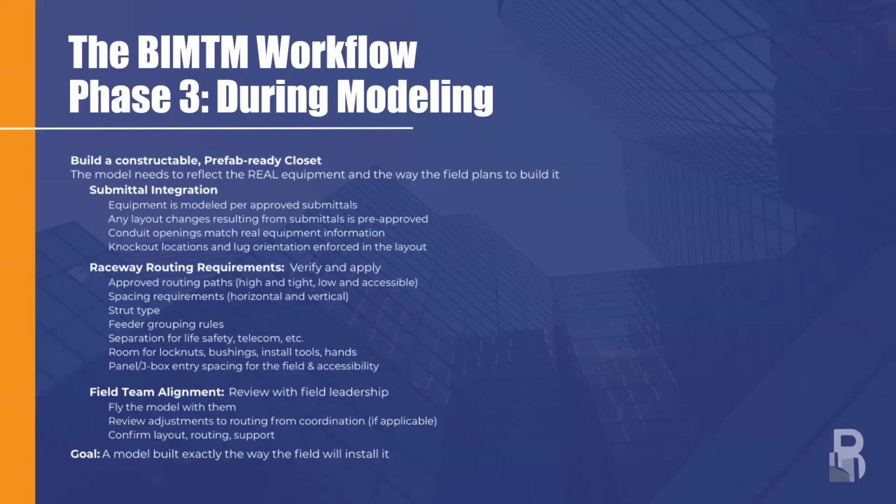And then the shop can start planning procurement. They can start planning staging. They can start planning scheduling with the other jobs and the other things that they have going on in the shop. And having a weekly check-in at this modeling stage as well builds rapport with the field team, with the shop, and the relationship. So we're all working on this for the same reasons, and ultimately for the same end goal.